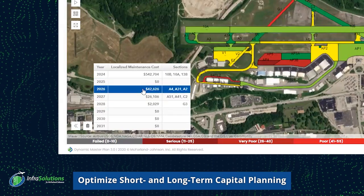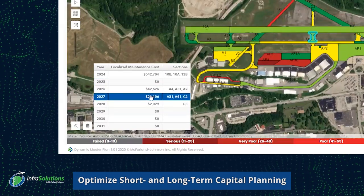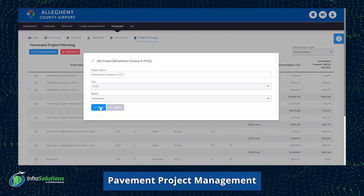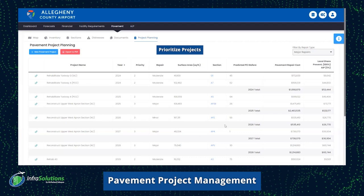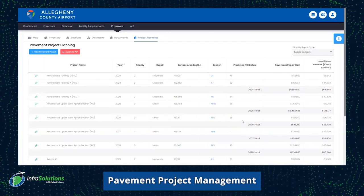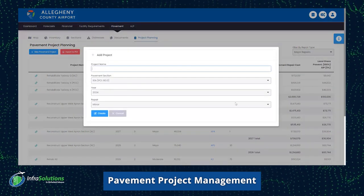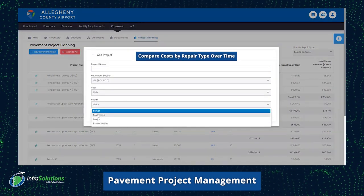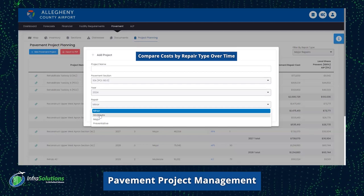With the provided data, airport staff will optimize their short- and long-term capital planning initiatives. This is made easier by our Project Planning feature, built so your airport management can add, remove, and prioritize projects in the years and dates they see fit. The Project Planning feature breaks down costs by square foot for preventative, minor, moderate, and major projects, and can compare repair costs by time if not completed.